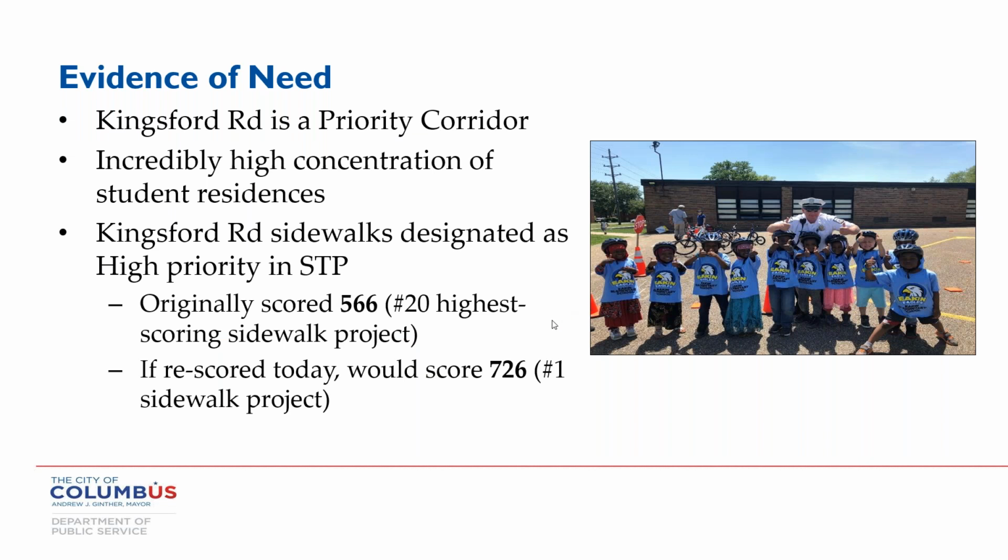When it came to the school travel plan itself, when we go through and start to get ready to select a project, typically I'll try and gather in our design and construction people, because they have a good sense of how long this is going to take, because this Safe Routes to School funding is federal. And so you have to go through the NEPA process. You have to work with ODOT and your local district every step of the way.